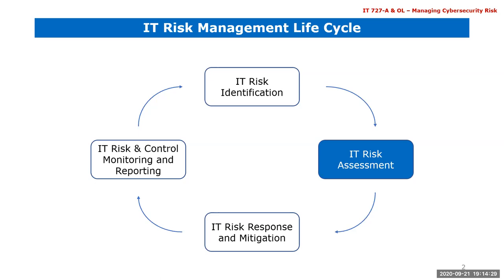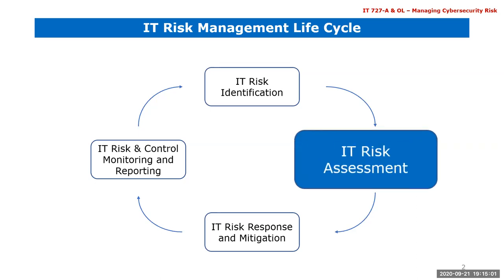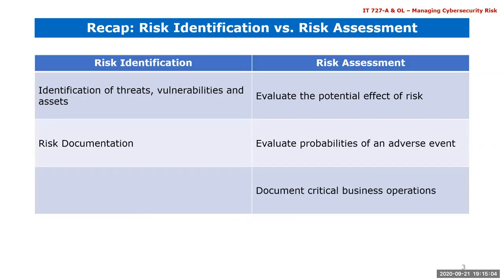The importance of documentation cannot be overstated — even if you don't want to document due to risk, document it for CYA. After identification, the next step is risk assessment — evaluating the risk and probabilities of it happening. The risk assessment complements categorization by looking at whether the risk is considered a big deal or not. There is overlap between risk identification and risk assessment; just embrace the process as it is not strictly linear.